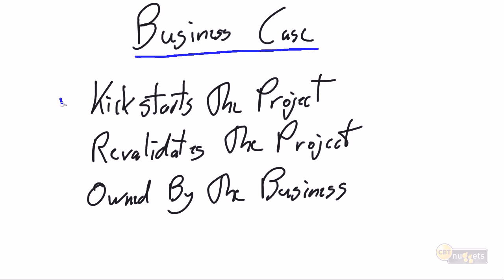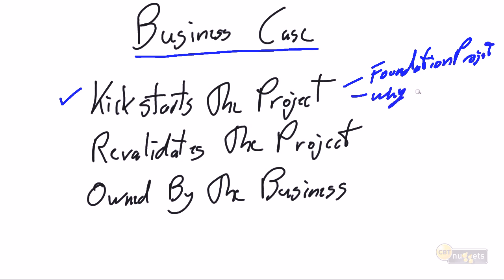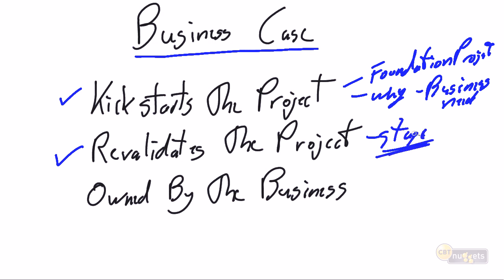In this nugget, we discussed the business case is the kickstart. It's the foundation for the project. It is why we're doing the project. It is the business need. The business case will be developed in outline form when we initiate the project. It will be fleshed out and defined as we plan the project, and it will be revalidated at every stage in the project to ensure that the business case remains relevant.